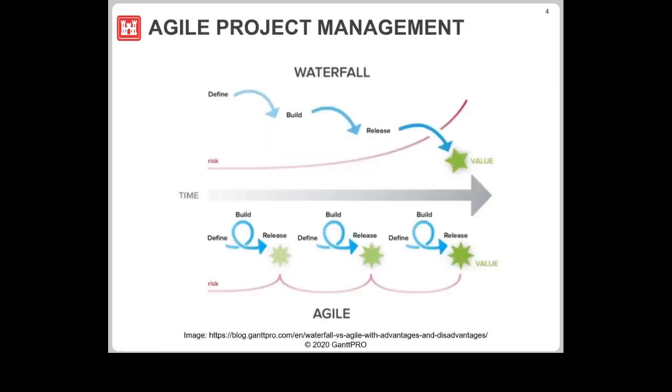This is just an explanation. So we just looked at the CI/CD piece. This is kind of how we manage the project. So agile project management and the traditional waterfall approach, which is how HEC-HMS has been managed for the recent history, we would define the version up front. We would define what features belong to the version up front. So it would say, this is 4.6, and this is everything that it's going to contain. And we're not going to release until we get everything done.